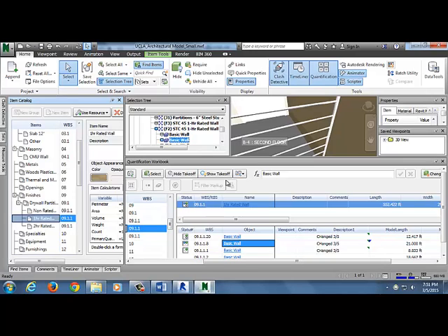And the situation where I would use this would be, I'm a project engineer, I just got a new bulletin from the architect, and it's for something with structural CMU veneer, and we've already got the foundations poured, and I want to know, what do they change here? And so if I wanted to be able to count that or visualize that quickly, I would use Navisworks. Or you can look at the plans as well, right? So it's just another tool to quantify and visualize what the changes are.